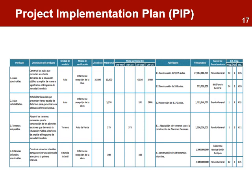The critical elements of the project implementation plan can be summarized in a planning matrix. The matrix will show the budget assigned for the project, a description of the activities, their duration, the expected outputs with targets and milestones, and the people responsible for each activity. This matrix is a useful tool to manage the project.